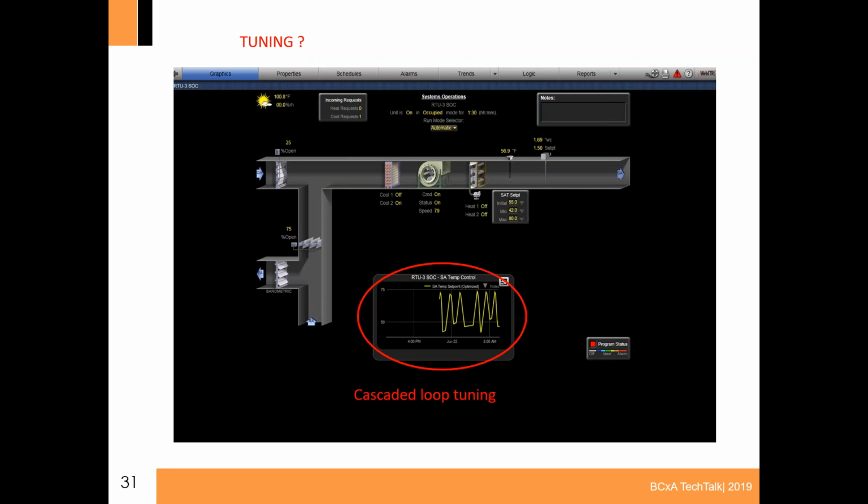If it's still an issue after 2 rounds of testing, our policy at our company is to charge the client, whoever contracted us, for our additional time and ask that they back charge the responsible contractor. But any loop tuning that we caught that was not working correctly, we would not leave that way with the client. We would oversee the resolution of that loop tuning on behalf of our client. I hope that answers the question.